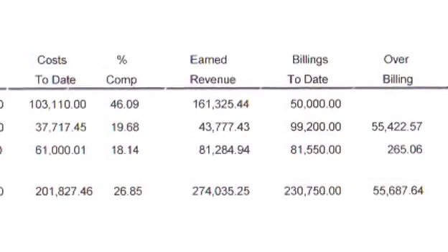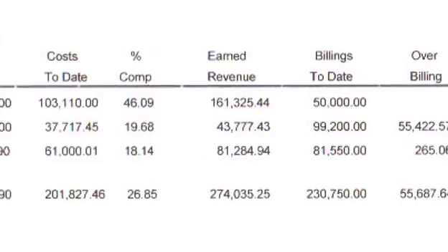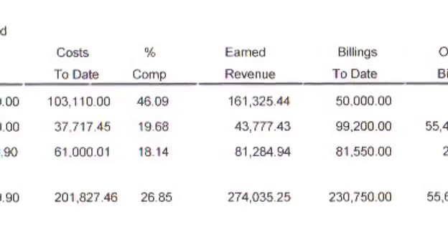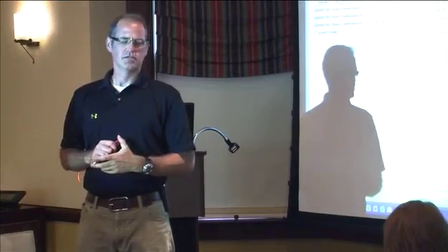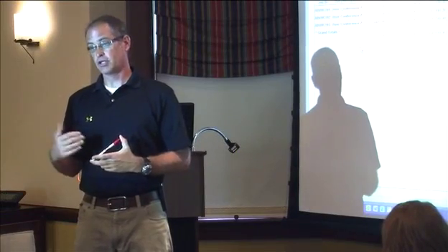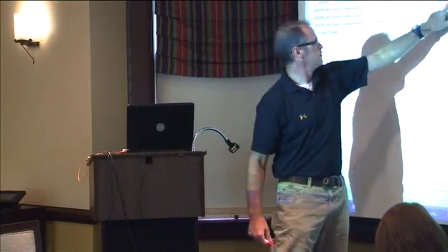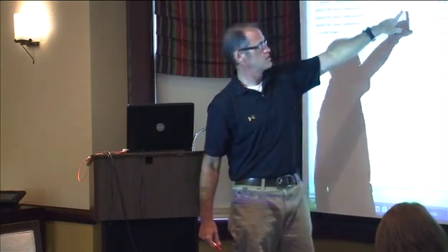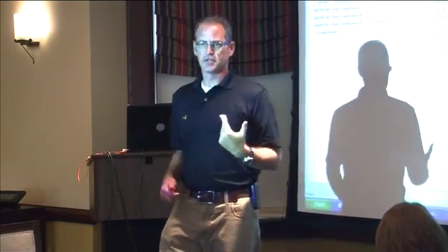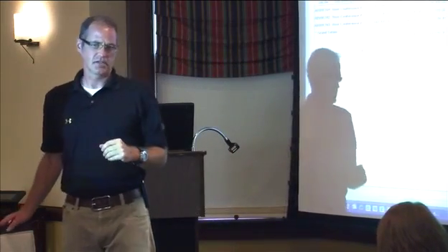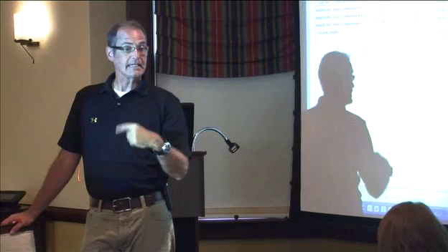A lot of people will look at this and they will do the forecasted hours at completion, or forecasted dollars at completion. So if you've got a project manager that can actually look at this and say, I've got my cost to date here of $103,000, my revised estimated cost of $123,000. If the project manager is good, he's going to tell you I got $100,000 left in this project. He can tell you that.